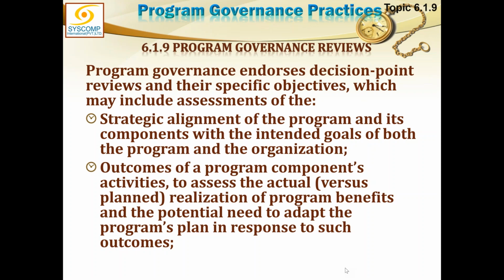We are not comparing the product, service, or result with what was planned and what is actual. Here we are talking about the realized benefits. We are assessing the actual versus planned realization of program benefits and the potential need to adapt the program plan in response to such outcomes.